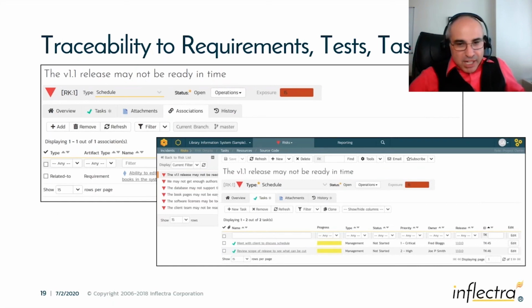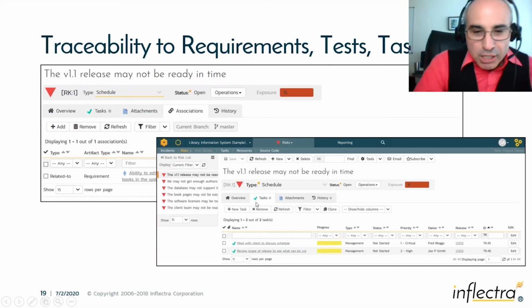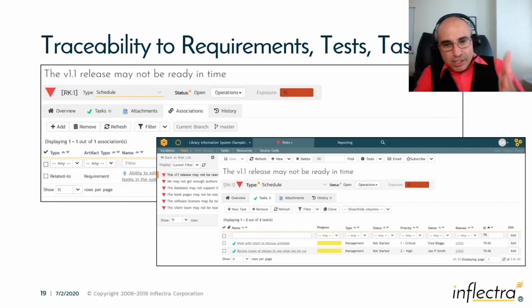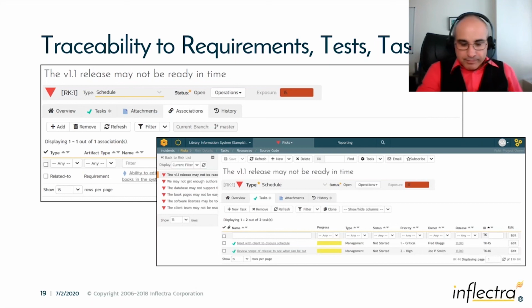When you write the risk and have the mitigations, you want to usually create an action plan. You can use the tasks tab of the risk to be able to document out the action plan in a series of tasks, which may or may not tie to the mitigations. And those tasks then get added into the standard work breakdown structure for the project in SpiraPlan. So that way, when you're looking at your timelines and your Gantt chart view or your board view, all those tasks that you generate for the risk mitigation, those are going to be put into the same schedule as all these user story tasks, the oversight tasks. So you can load balance the team, and you can also make sure that all the tasks get done by a certain date. So it becomes part of your standard plan for the project.